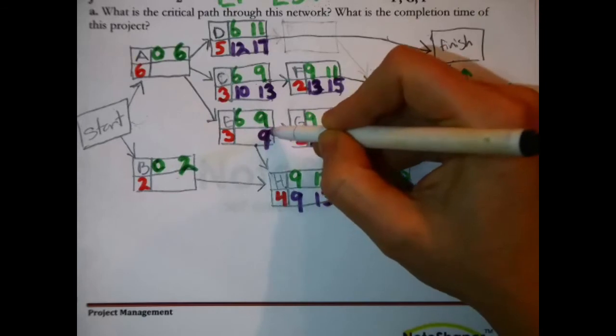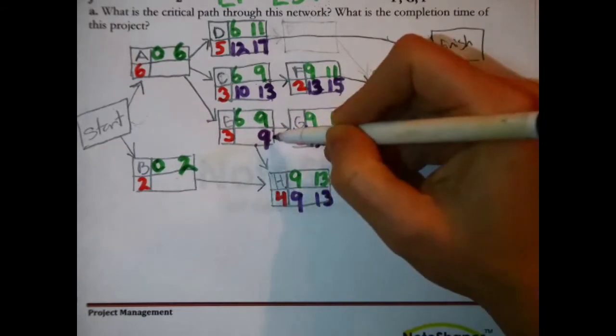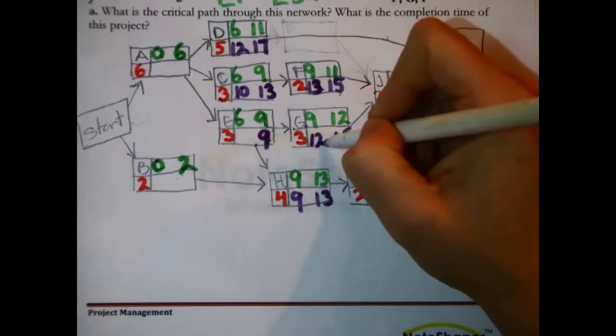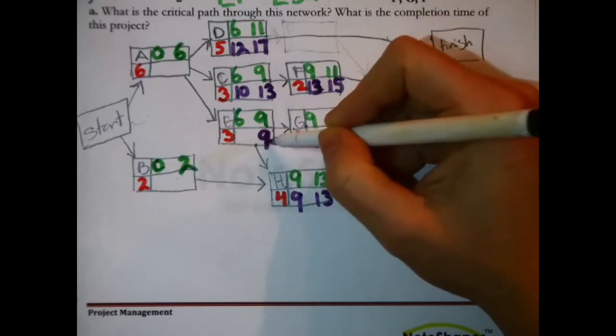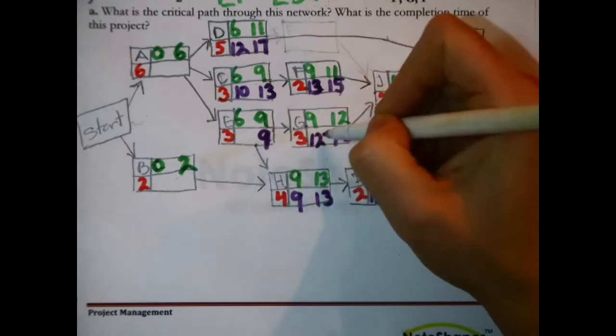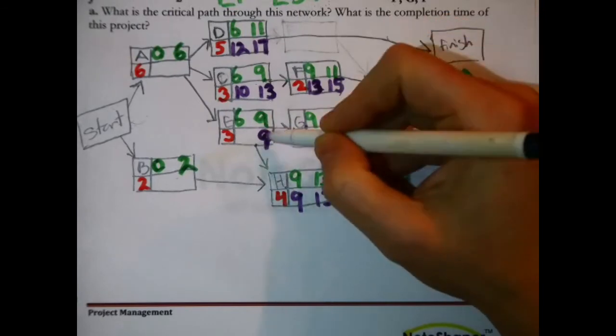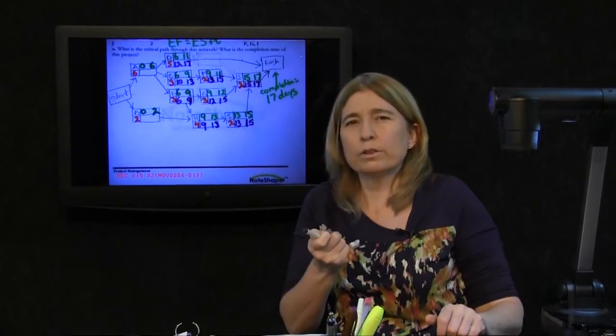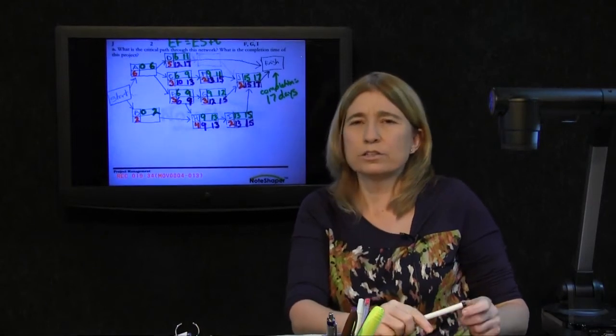It was right, my instinct to pass that 9, but I could have made a mistake if I did not check this, because you always want to pick the smaller. If there's more than one follower, you don't want to delay anybody. 9 minus 3, the late start time for E is 6. And that reasoning we went through just then is known as the late finish time rule.